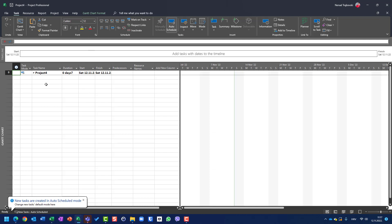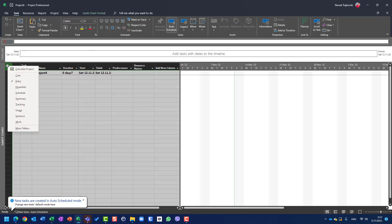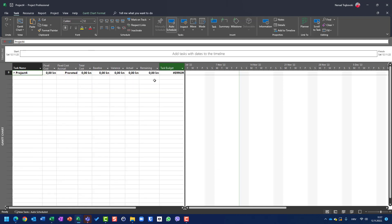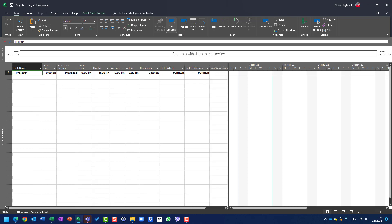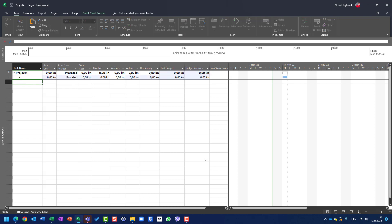Let's go to another project just to see if we have those fields included. Yes, we have. And I have an error — because it is the sum of all task budgets and all budget variances for all tasks, but I don't have any single task yet. When I create a task, here it is.